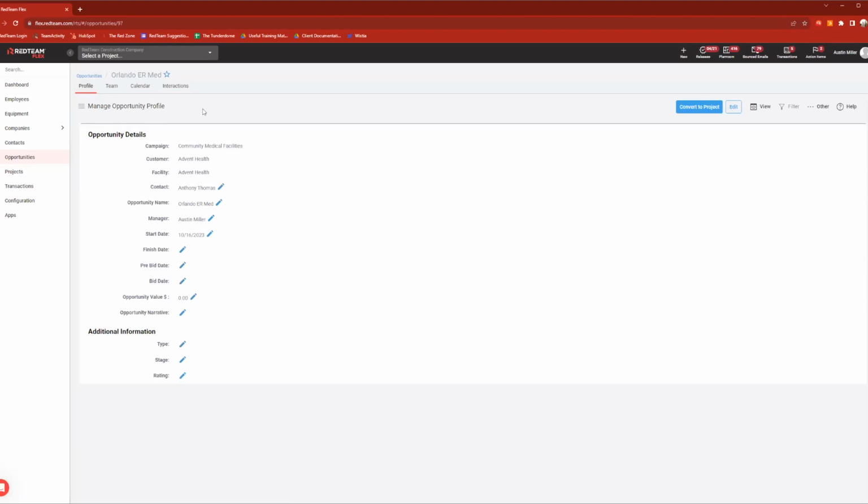Main point is gathering information really to help you make the decision of, is this going to happen? Is the customer going to follow through with this? And do we want to bid on it? If both of those are a yes, once we make that decision, that's when I'd want to come back to this profile page and I can click convert to project. That's going to take all the information here in my opportunity and create a project for me. So I don't need to go enter a new project for something that I've already made an opportunity for. No need to double enter, convert to project. It'll create the project, and then we can start working through pre-construction.